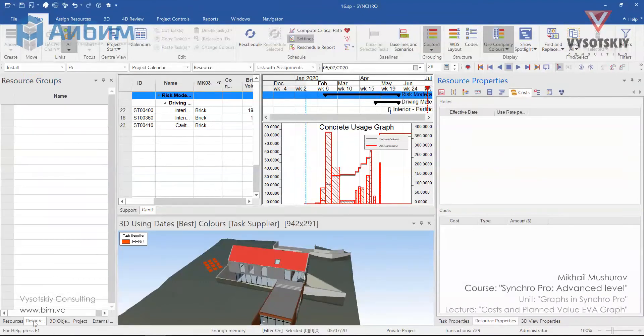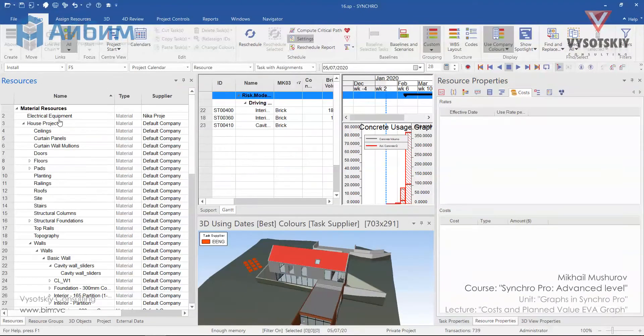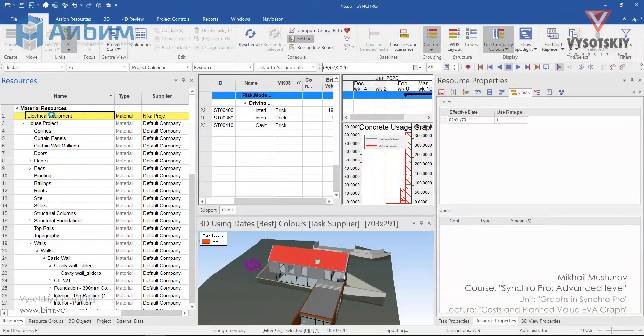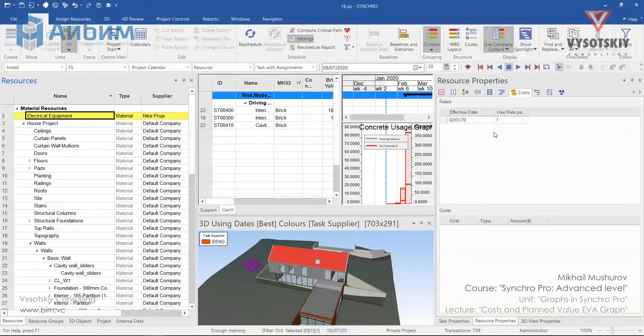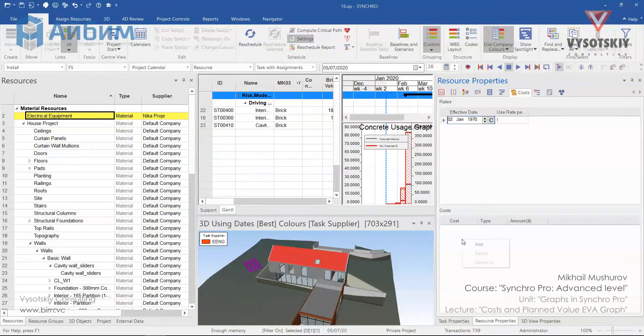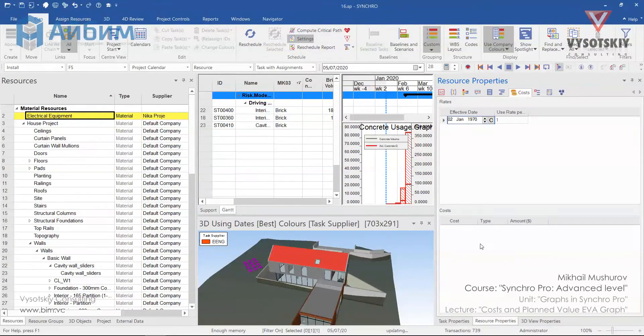Let's select a resource, for example electrical equipment. Under the rates panel, select the effective date row so it's highlighted. Make a right click over the costs field and choose add. And it will be a fixed cost for our electrical equipment.